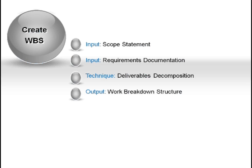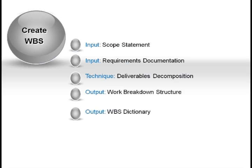The finished WBS is a major component in understanding what the project is going to do. The WBS dictionary is a project artifact created while doing decomposition of deliverables. It provides more detailed descriptions of the work packages and control accounts, including information like what organization is responsible, schedule milestones, quality requirements, cost estimates, and contact information. The WBS dictionary information can be stored in various tools or formats such as WBS Chart Pro, a Word document, Excel spreadsheet, MS Project file, or even a Visio chart. Find out what the standard is for your organization.